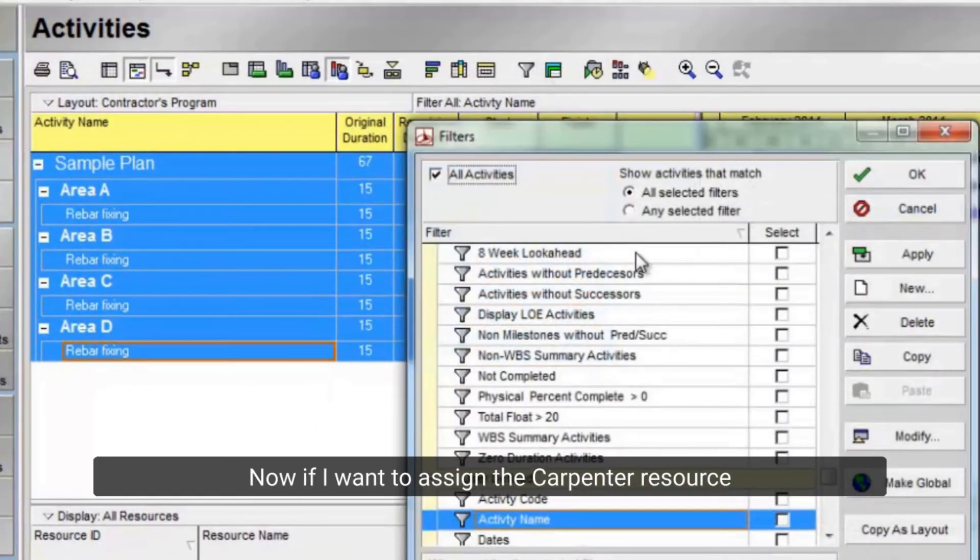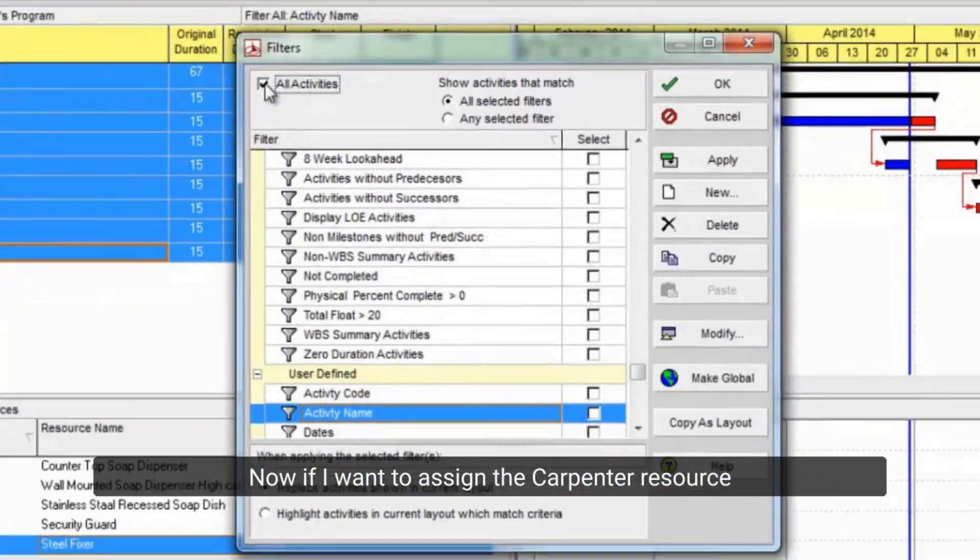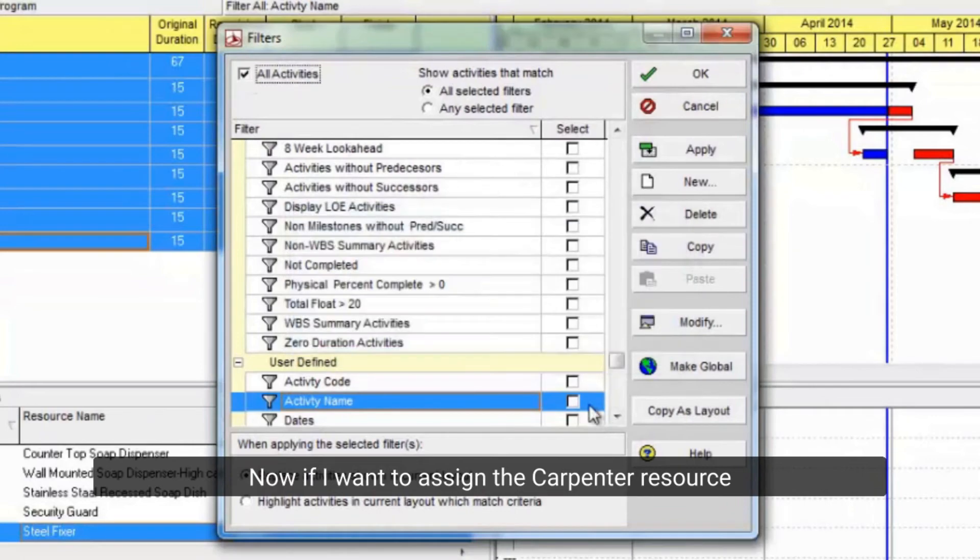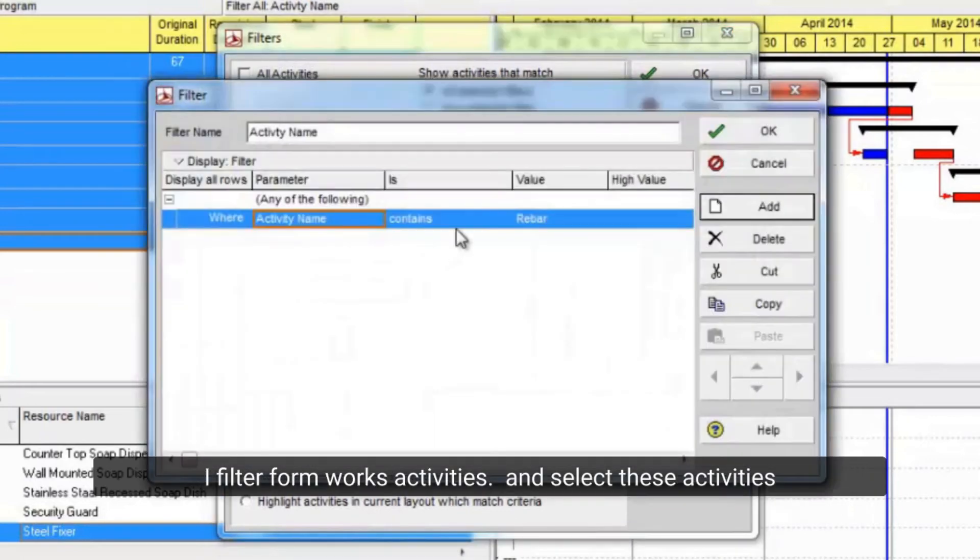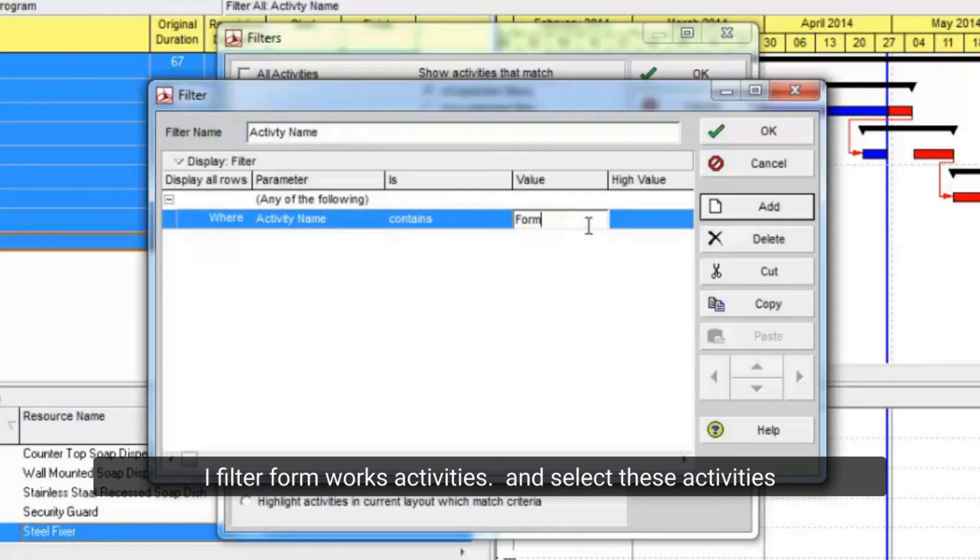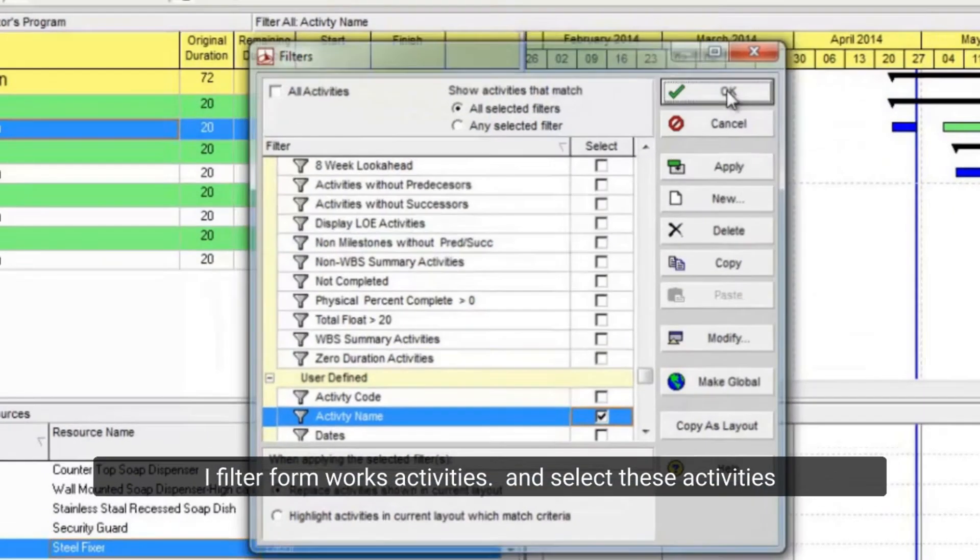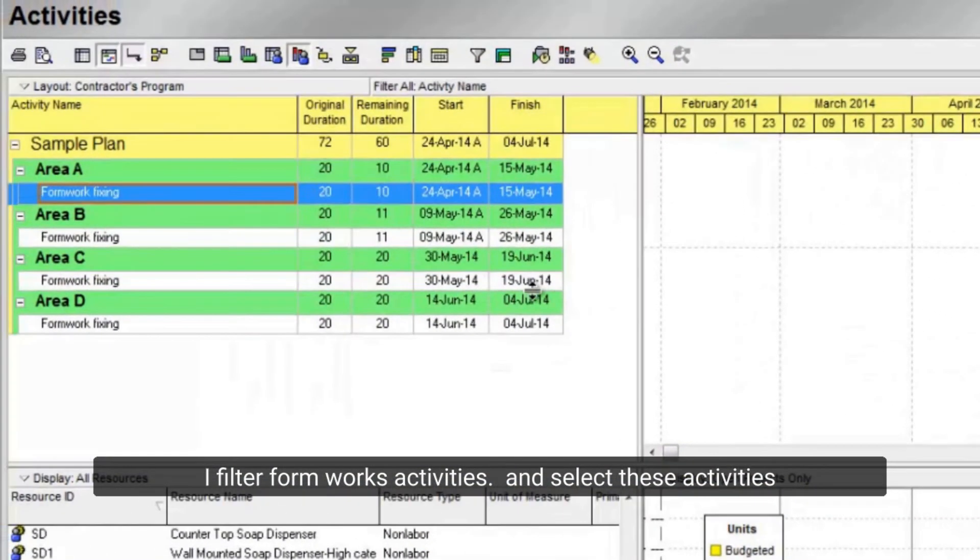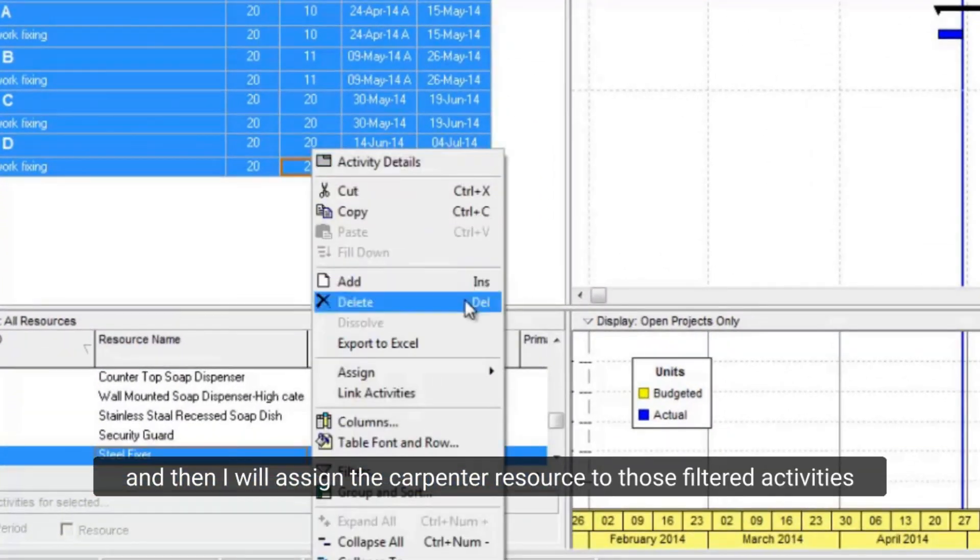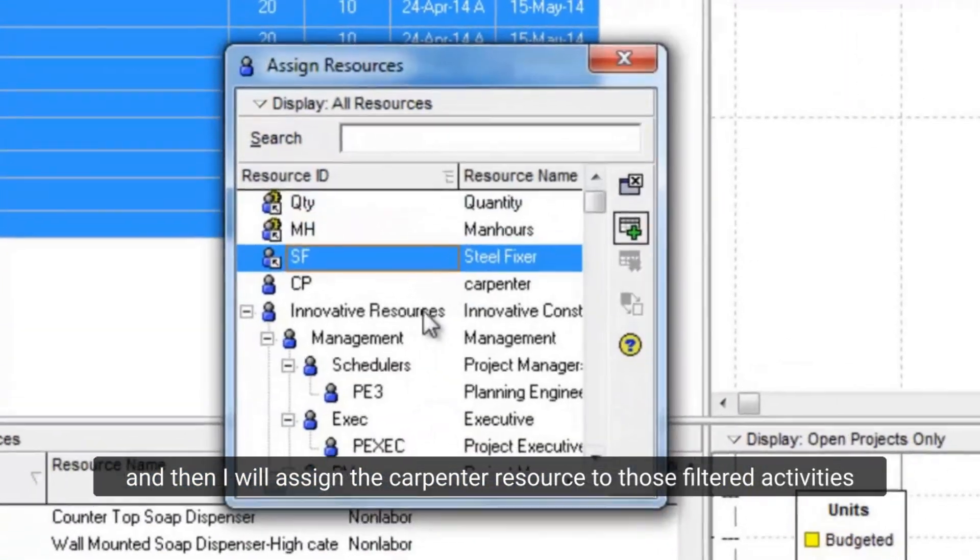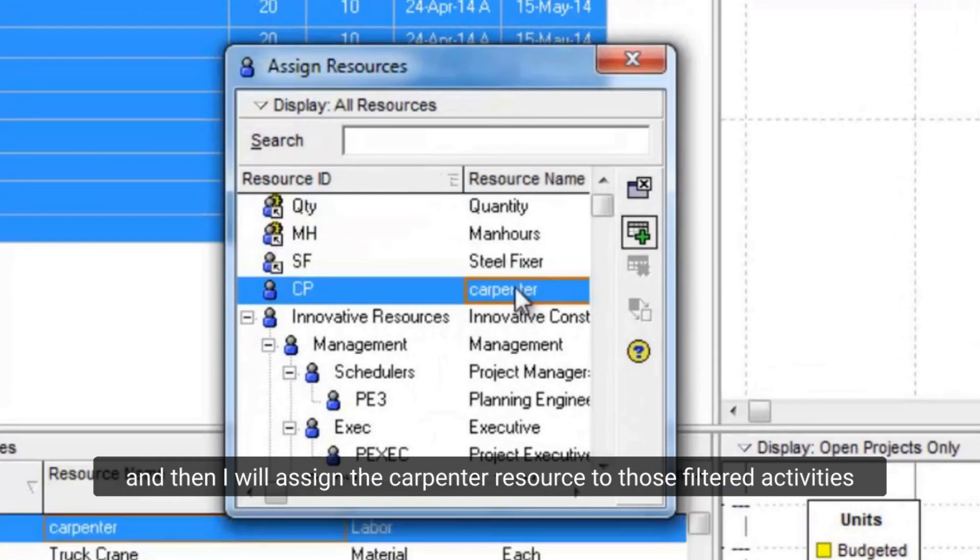Now if I want to assign the carpenter resource, I filter FormWorks activities and select these activities. And then I will assign the carpenter resource to those filtered activities.